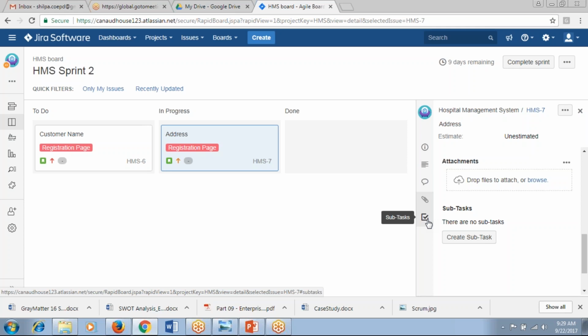Yes. And all this will be done in your daily Scrum meeting, where the Scrum Master will ask you how much of the task you have done. Then it will be moved. If you are facing any impediments, you tell what impediments you are facing, right? If you are going to take new tasks, you can take new tasks there. Let's suppose within 2 weeks' time, a few of the tasks are not done, then they will be moved back to the product backlog.